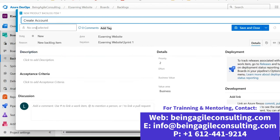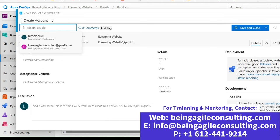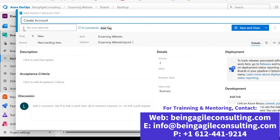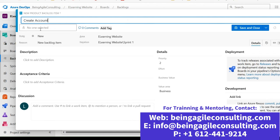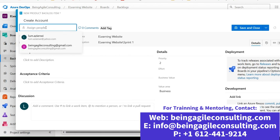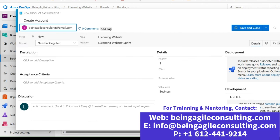When creating work items, it's advisable to leave the assignee empty during planning if you're not sure who will be working on the item. But if you are sure, click on that space and the team members will pull up — just select the person. You can also add tags here. The state is a new work item. Here is where you enter the description following the layout of a good user story: as a student, I want to be able to create an account on the e-learning website so that I can access courses.